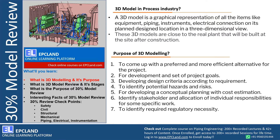To identify required regulatory necessities — there are so many regulatory authorities, laws which we need to follow. We need to submit documents so they can review and approve them before the next stage of 3D modeling can start. For example, before issuing the plot plan, we have to submit it to regulatory authorities so they can approve it, and those equipment coordinates will be finalized. The 3D model helps us extract those drawings to share with regulatory authorities. These are a few of the purposes — there are many others — and this is how 3D modeling is important in the process industry.